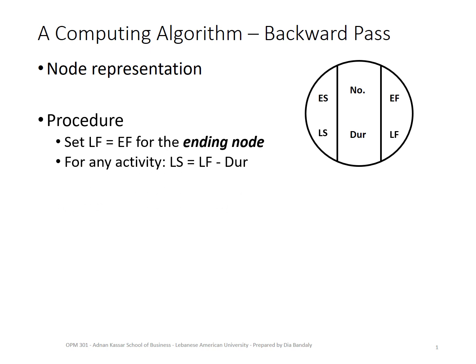So we have the latest finish and we have the duration, and now we find the latest start. How? It is equal to the latest finish minus the duration. Simple. Always remember, when you're doing the backward pass, don't forget that the project happens in a forward way, right? From starting to the ending. Here we're only doing the calculations backwards.